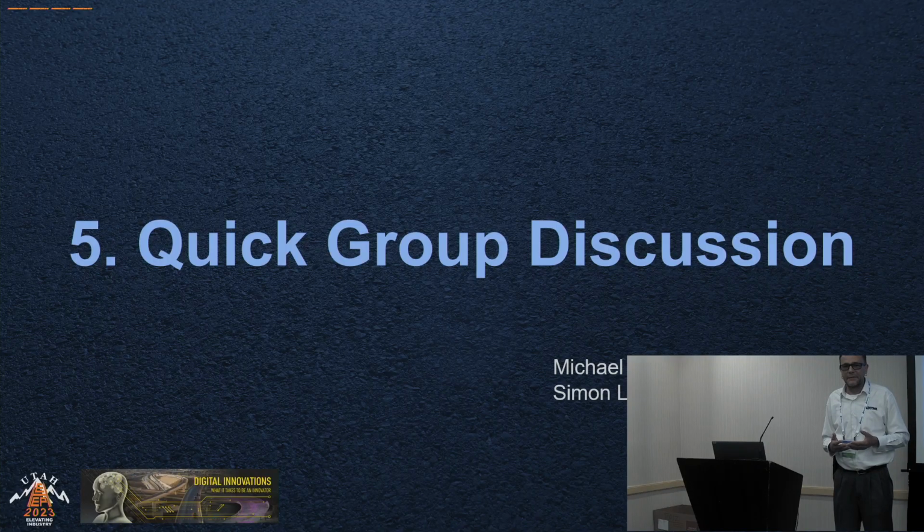Mobile LiDAR, would you use? Terrestrial. So you set up to shoot all these curb ramps. Yep. It's a lot of data. But it was worthwhile. It took us, I think, 6 months to get everything modeled in its entirety. But again, it was for asset management purposes and compliance.